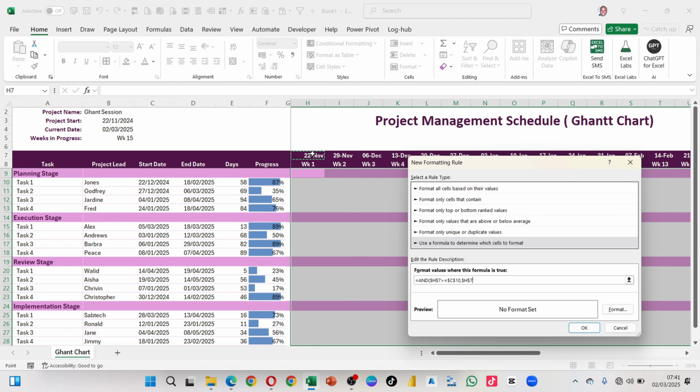This, that is still the start date of the project, is less or equal to the end date. So the moment the start is greater or equal to the start date we have on the task, and the start of the project is less than or equal to when the task is ending, then what should we do? So I'll close the brackets here.